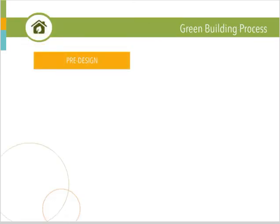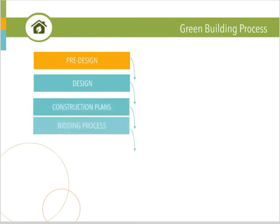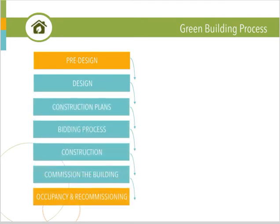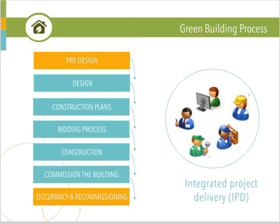In contrast, green buildings follow an integrated project delivery process that integrates all stakeholders, systems, building structures, and practices. This way, the talents and insights of all participants are collaboratively harnessed into an integrated design team. The benefits of this process are optimization of project results, increased value to the owner, reductions in waste, and maximum efficiency throughout all phases of design, fabrication, and construction. Additionally, this process ensures lower operating costs throughout the lifespan of the building, because each system is optimally sized since team members worked together and communicated throughout the design and construction.